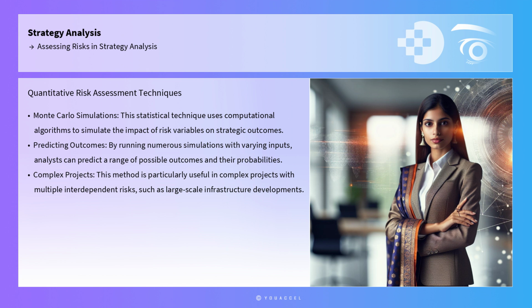In addition to the risk matrix, Monte Carlo simulations can be employed for a more quantitative assessment. This statistical technique uses computational algorithms to simulate the impact of risk variables on strategic outcomes. By running numerous simulations with varying inputs, analysts can predict a range of possible outcomes and their probabilities, providing a more comprehensive risk picture. This method is particularly useful in complex projects with multiple interdependent risks, such as large-scale infrastructure developments.